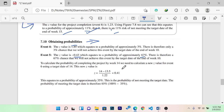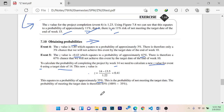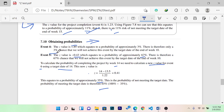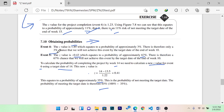To calculate the probability of completing the project by 14 weeks, we need to calculate a new Z value for event 6 using a target date of 14 months. Then the Z value of 35% is the probability of not meeting the target date of 14 months, and the Z value of 3% gives the chance to achieve; the Z value of 97% means we will achieve.